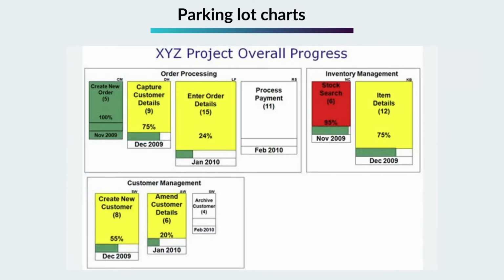In larger projects, especially those following the feature-driven development (FDD) approach, the number of user stories is high, making it challenging to manage and communicate their status effectively. In the FDD approach, parking lot diagrams are used for summarizing the progress of the project. The FDD method divides the project in the form of user visible features. It uses boxes to relate the various levels of product backlogs and different colors to display the status of the backlog. Here's how the parking lot chart works in FDD.